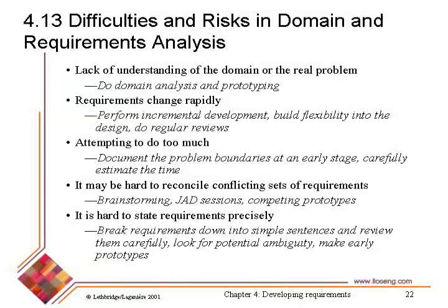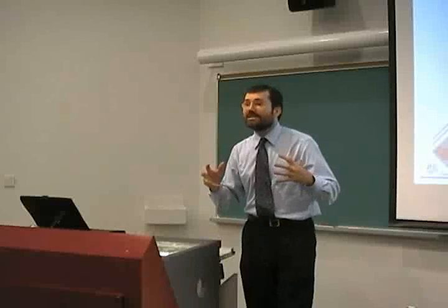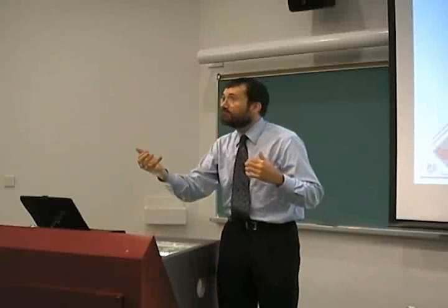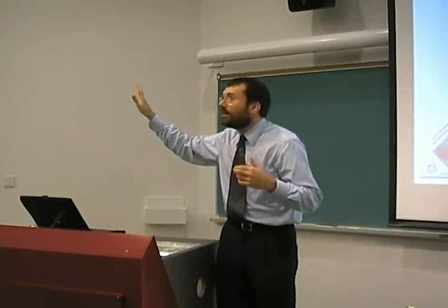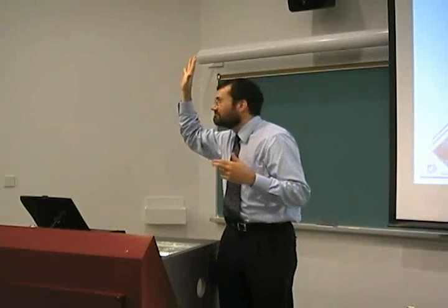Requirements will change. This is the risk we talked about on the last slide. So make sure that you anticipate that. And the number one thing to tackle potential changes is incremental development. Incremental development says we're going to do a very small system first. This very small system will please most of our users most of the time, but some of the users none of the time, and none of the users all of the time. Okay, you get that?